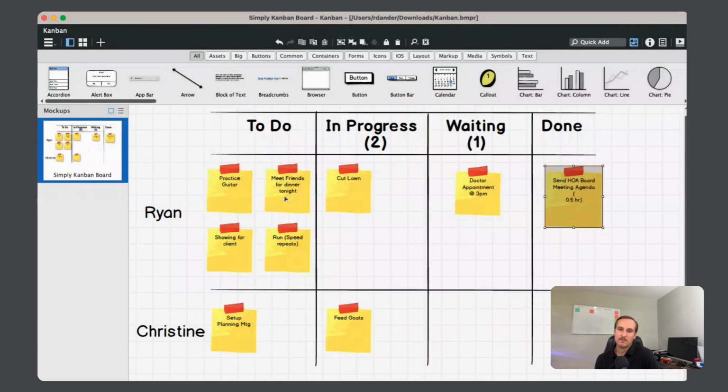You can define them more generically for what is the definition of complete. So for example, how do you know something is done and you're able to move it to the done stage or column on your Kanban? Maybe, for example, a business associate has to check off and approve it, or someone has to sign a document, or someone has to provide feedback, or maybe there's a testing phase.